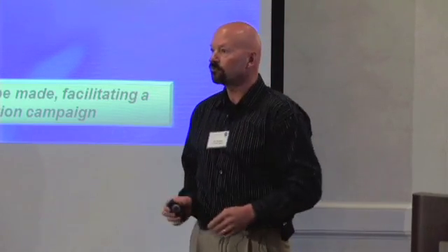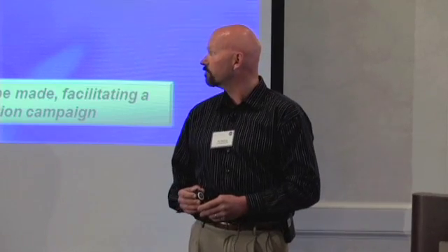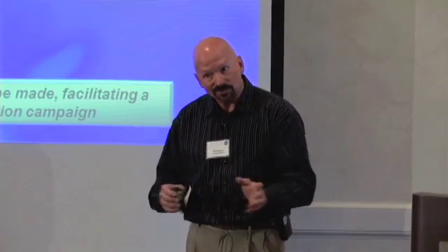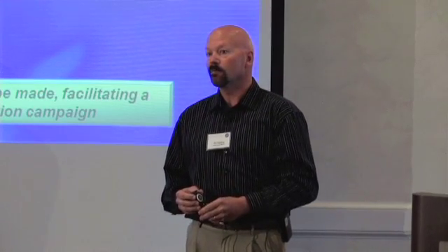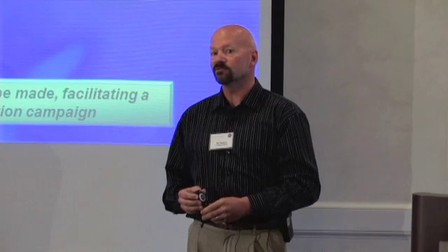All right, so your cost cap, there's pressure to get the team rolled off. If you leave the staffing where it wants to be, it's going to stay pretty flat until launch, because everybody wants to be a part of the launch. They want to make sure that they're following what they've delivered. You can't have it. You've got to push the staff down, get people off. But if you're too focused on that, you're going to miss the fact that the labor that you have allocated can't close the tasks that are remaining.